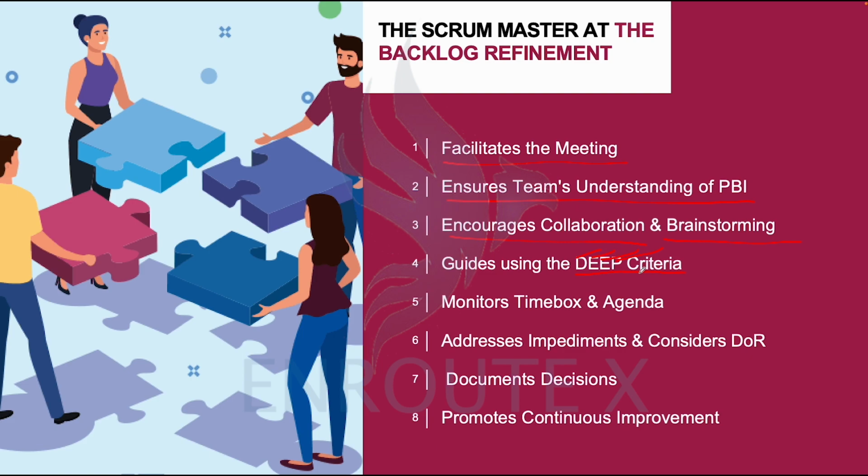All necessary things you need to do to deliver value is what you would go through. So we're ensuring that the DEEP criteria is followed. Each of those stories is prioritized based on the angle that the product owner wants it. It could be prioritized based on value. It could be prioritized based on what we could deliver first. It could be prioritized based on which one gets to the market first to cause market disruption. It could be prioritized based on different things, right?